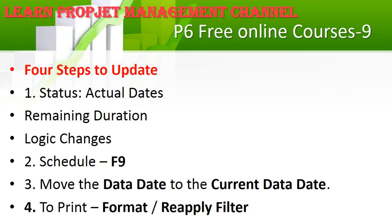After updating, press F9 for the schedule calculation — the program will calculate the earliest dates, remaining dates, and all your units. Then move the data date: if you're recording progress through February, add all your information, do F9, change the data date, and the program will give you all the update information. You can also print reports — I'll show in one or two lectures how to create reports tailored to different audiences: executives get a summary, project managers get detail, and clients get their own format.